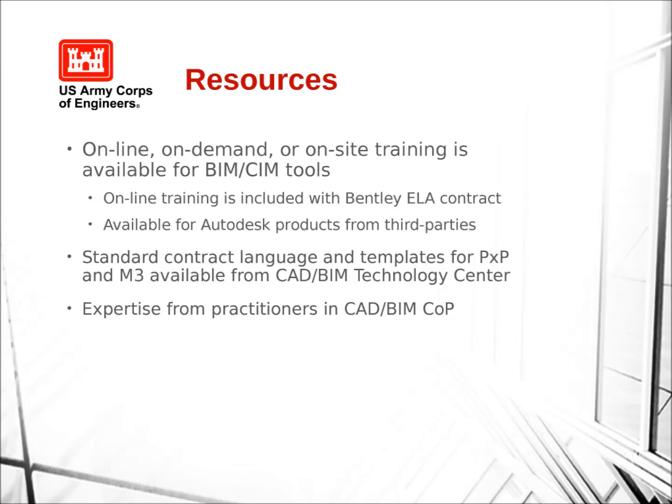Sorry, I think I might be breaking up a little bit. We are targeting the release of updated contract language for the BIM requirements in May, and that will be a 3-part specification. It's not going to be referred to as Attachment F anymore, but as you are developing your RFPs for either design-build contracts or design-bid-build AE scopes of work, you want to make sure to coordinate with your construction field office to ensure that they still have that demonstration meeting as part of their pre-construction work to make sure that everyone's on the same page as far as how your advanced modeling will be utilized and how that is going to be continued through construction activities.